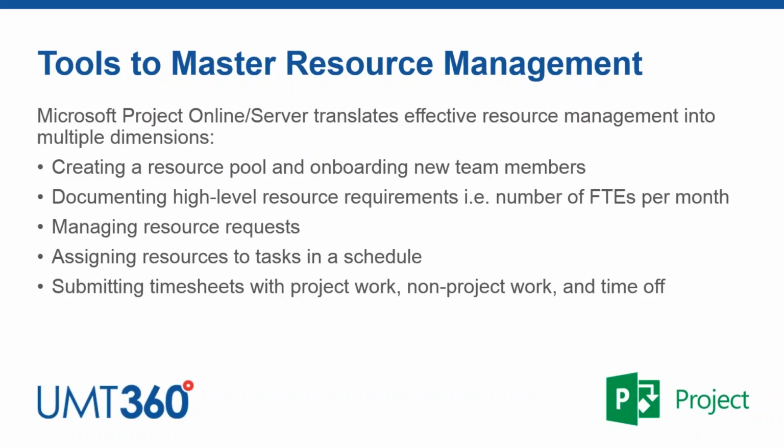So for example, if you're planning out new projects that are still in the pipeline that have not been approved yet, trying to understand how many people do I need? In what time periods? Is it by month or by week or maybe by quarter perhaps? You may not even have a detailed schedule just yet, but having the ability to do the high-level planning is also really important, and the platform allows you to do so.